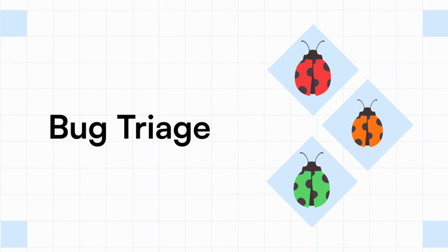Bug Triage Session, an event where the QA team can share and escalate problems to the development team, and in cooperation with the product owner, producer, and team leads, define what priority and place in the queue to fix the bug should take, and what impact it causes to the project, budget, or work velocity.